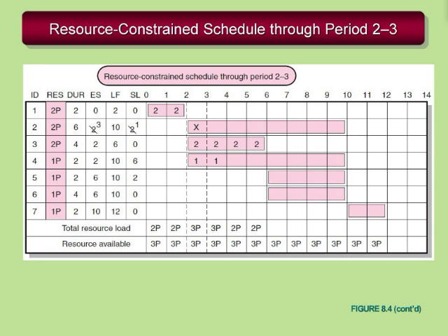We only have 3 resources available, so our hand is sort of forced. Even though we want to start activity 2, we can't, because that has the least amount of slack now. But since we want to schedule people as long as possible, we'll go ahead and schedule out activity 4 and get it done early so that we have resources available later when we need it. And so in doing so, we've gone ahead and lost, at least initially for day 3, any slack available in activity 2, and this drawing also shows that as well.